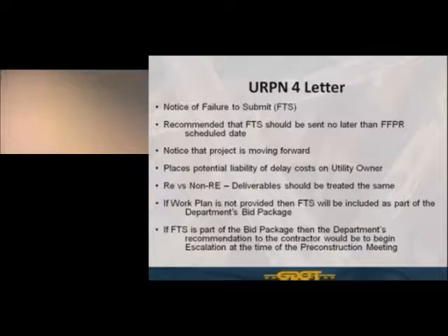Now, historically in the past, what the state office has recommended as a guideline, and this goes back to the relationship and true partnerships that we have and want to continue to build with the utility owners, is that if you had a deliverable that was due last Friday, but you had contacted the district office and said, hey, I need another week to get that schedule in or that set of plans in. And in the past, when that's occurred, within that week, that deliverable was provided to the department, then that's probably something we could accept, and that goes back to that relationship and partnership. And we could hold off on the FTS letter.